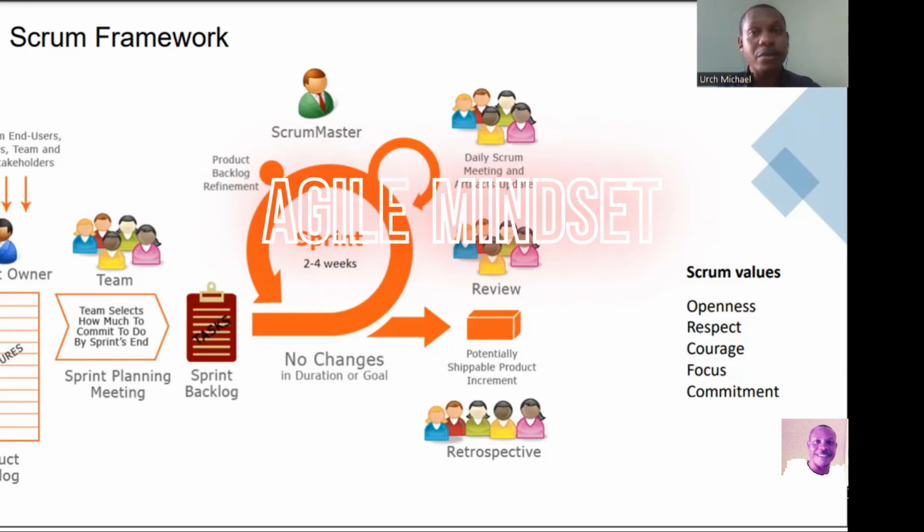Okay, so it's going to give rise to new features. He prioritizes the features so that in the next sprint, the team is going to sit back and look at which among these features could be more important to work on in the next sprint. Then once the team is done with that sprint, they're going to come back again, pick up items or features from that product backlog, and transfer the features into the sprint backlog as the tasks that will be accomplished in the current sprint or in the upcoming sprints. I want to believe I'm clear enough.